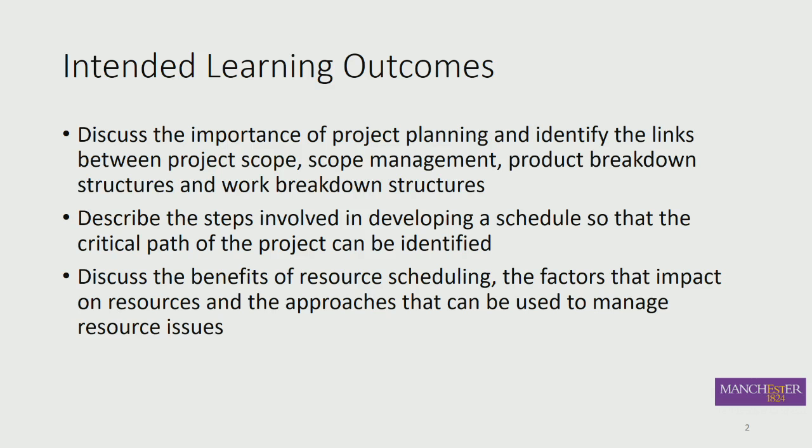And I guess just to follow on from that point, if you think of a company like BAE Systems, they're a systems integrator. And you'll see in these slides there's an example of a nuclear submarine, actually, a product breakdown structure from BAE Systems. So how does BAE Systems operate? Well, they have a strong supply chain. It's not uncommon for an original equipment manufacturer like BAE Systems to do minimal manufacturing and design of some subsystems at all. They procure the subsystems, and their role is to integrate the systems through assembly, through integration type manufacturing tasks and test. So some of these examples are assuming, and it's always dangerous to assume anything, that all that concept design and requirements and all this early stuff which has to be done to name anything in the first place has been done by a supplier, and they're actually supplying a subsystem which can be assembled.